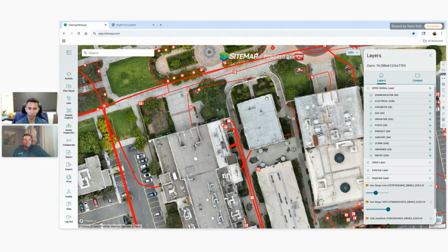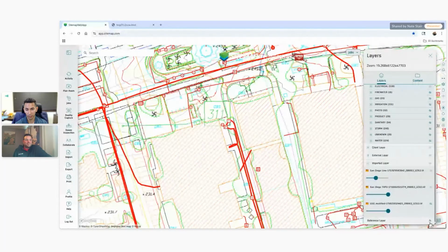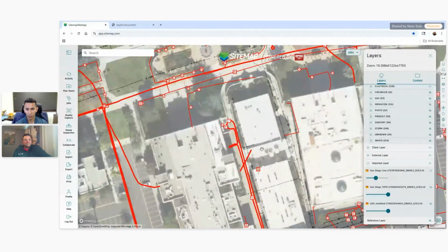So as part of that project, we're going to install an elevator. And when we were going through the design, the elevator is going to go in that bottom left corner of the building. So when I saw that, and then I saw the SiteMap data kind of populate, the question was: how does this exactly tie in electrically? Because the electrical room for that building is in that corner as well.